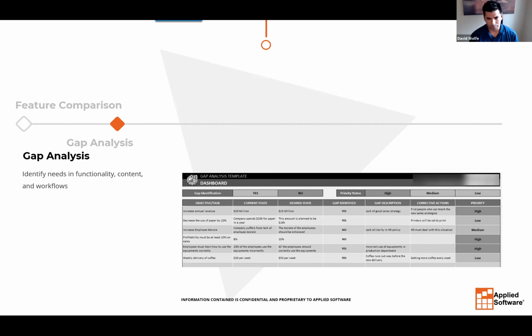And so the gap analysis just has a role, again, of saying, maybe there's some content, maybe a company does a specific set of work around material type, let's say resistor-flex, and maybe that's not in the out-of-the-box content. Well, needing to identify how you're going to get that, if that's a major portion of your project, you need to identify that up front so you know how much time to build into either purchase or create that type of content.